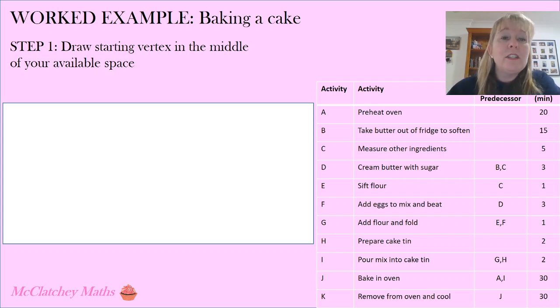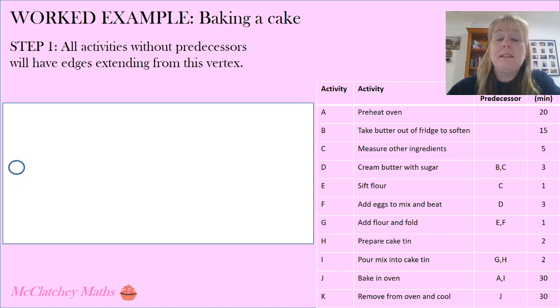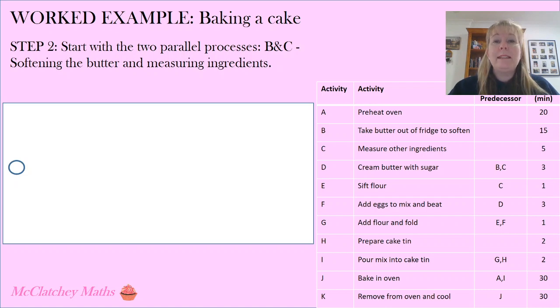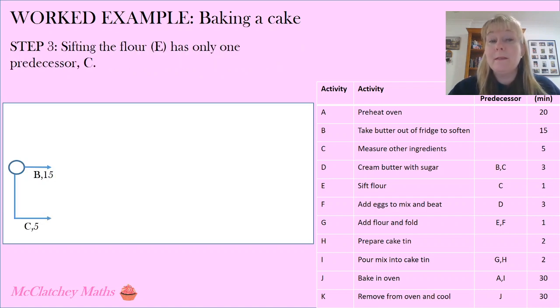So let's get started by drawing it. Our first step is we're going to draw that starting vertex in the middle of our available space on the left hand side. Step two we're going to have all our activities with no predecessors extending from that vertex. In this particular video I'm actually going to draw, because we've got a few of these activities that are going to come out of here A, B, C and H. So I'm going to leave some of those very simple activities, preheating the oven activity A and preparing the cake tin activity H till later on in the video once we've worked out where the space is going to be available. Put your more complicated activities and processes through the middle and then add your parallel edges later on. So let's start with B and C. They're our first two parallel processes. Softening the butter, measuring the ingredients. I'm going to move C down a little bit so I've got a bit more space.